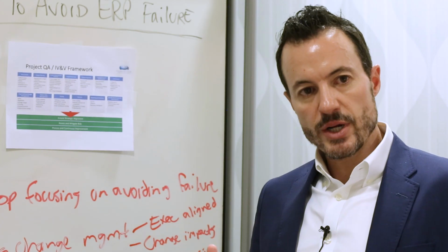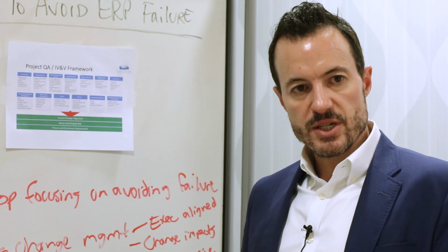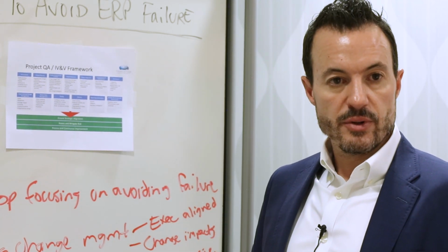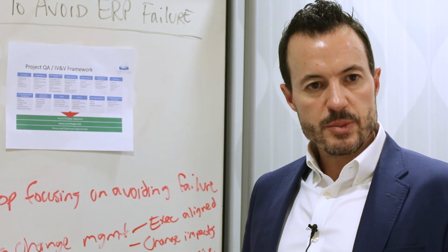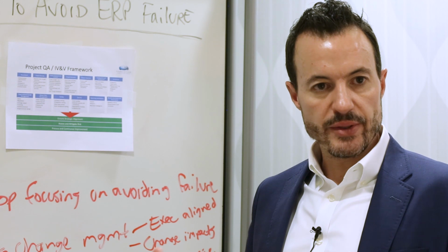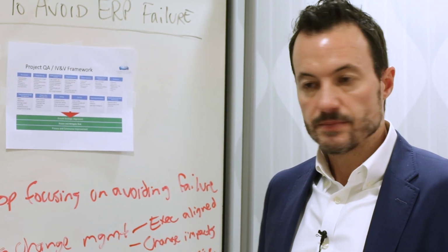So that testing process is extremely important, particularly as it relates to user acceptance testing. A general rule of thumb is you should have at least 3 rounds of user acceptance testing. Oftentimes system integrators will try to get by with 1 or 2, but you definitely need at least 3. We found that to be the most important or the minimum that you'd want to see.